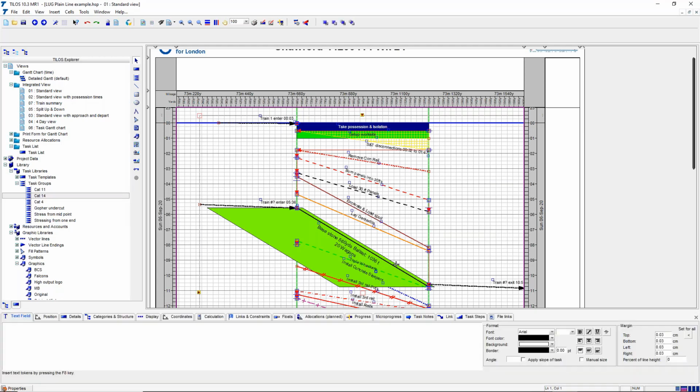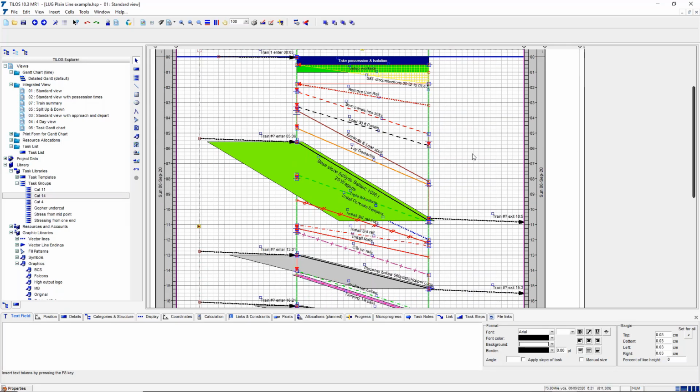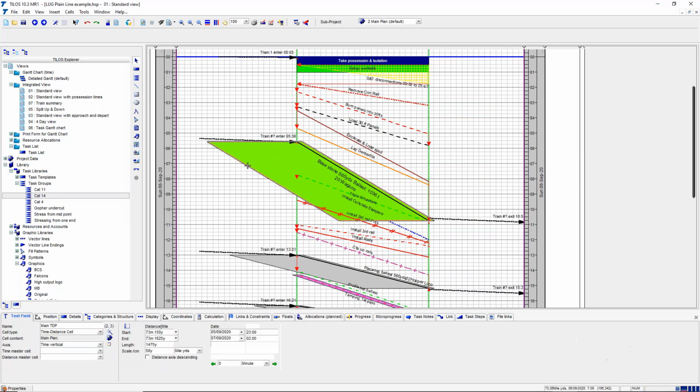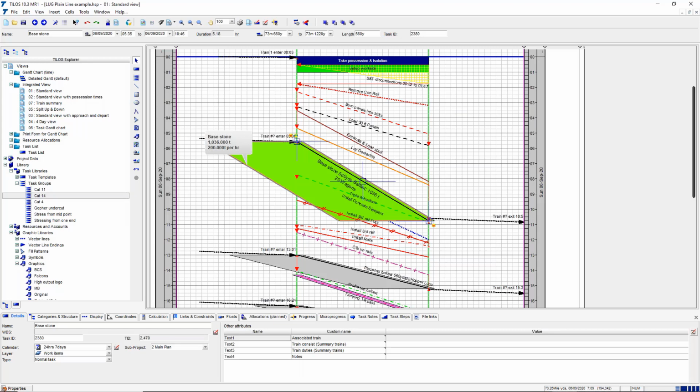So it's going to scale by distance the elements that have already been predefined, and it's using certain parameters and certain resources. So if we look at this representation, this is a train which has got certain wagons, and they're full of ballast, or they're going to take the ballast that's been excavated, and it's calculated that there are 20 wagons, and the length of that train is shown on the diagram. So the train is sitting on that bit of track whilst it's happening, and then at the end of the process it's sitting on this bit of track because it's filled up its last wagon here.